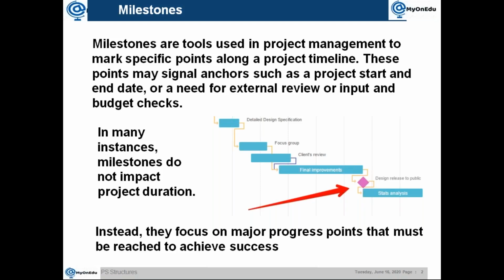Second thing, there are other usages from the SAP perspective. You can use it for progress analysis. You can use it for billing. There are different extra functions SAP has given in the SAP milestone. So when you're talking about programs, for example a milestone in MS Project, you can make the relationship with the other activities, but in SAP we don't have that.